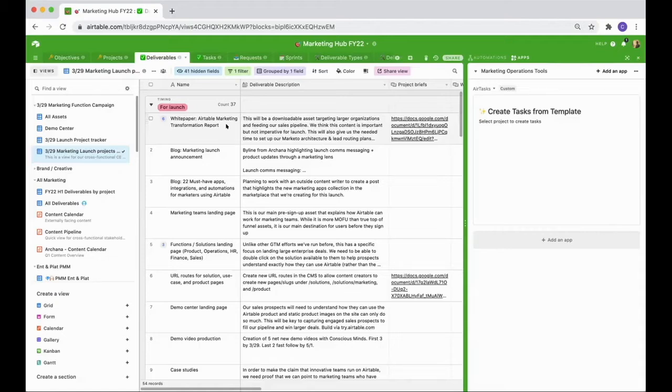But to Cody's point, something I've always found with production is that there are these repetitive tasks that you know you're going to have to do every time. Even having a starting point, okay, here's the typical framework, allows me to predict how long it's going to take to produce something and have a much better sense of, okay, this is not realistic to ship in a week because I can see in my tasks it's going to take 12 days. Or it gives me the opportunity to say, okay, here are some ways I can cut away, or here's something I can condense or skip if I really do need to hit a deadline. So it's really powerful for us on the content production side.